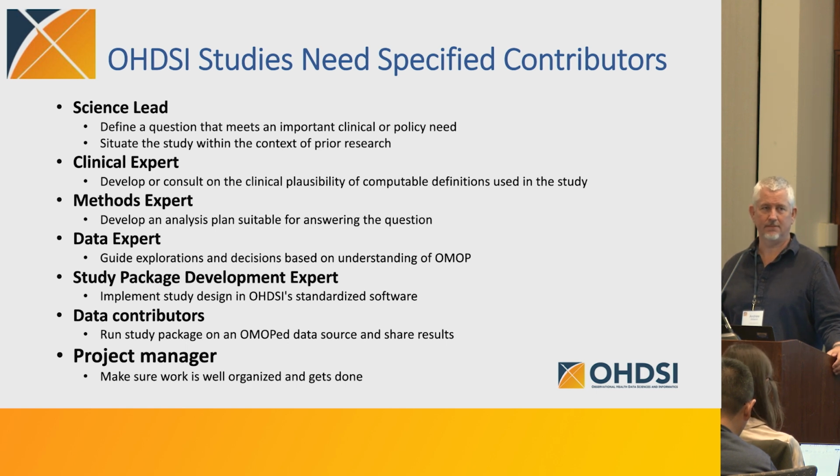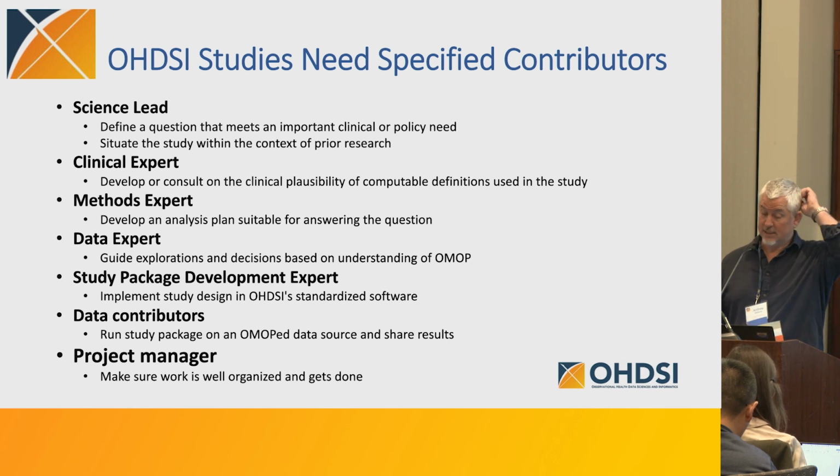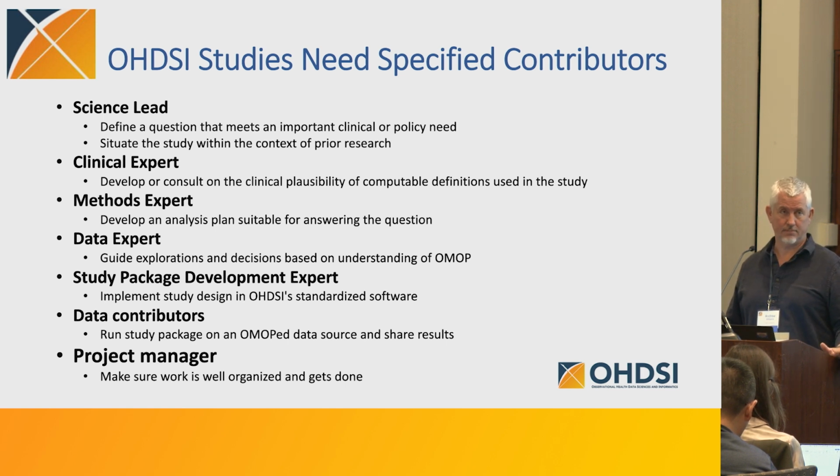Yeah, absolutely. Before you go and distribute your study package to everybody, make sure it works outside of your own environment. Left me in trouble before. I love that advice. You need to have some data contributors that are your close friends to do the package development in concert. It might be worth calling out as a separate thing here, a package development site or package testing site, as separate from other data contributors. That's really maybe a good addition there. Thanks, Jamie.